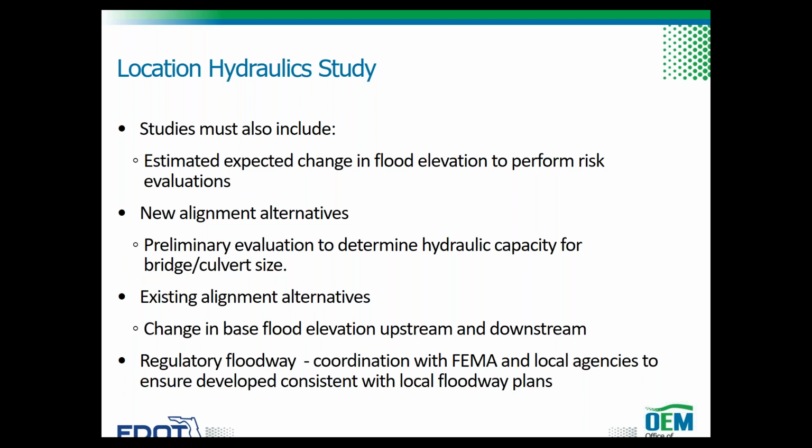The location hydraulic study should also evaluate the floodplain impacts to determine any increase in the number of flood receptors, as well as increase in damage to flood receptors as a result of the increase in flood elevations. If necessary, appropriate coordination with FEMA and local natural resource and floodplain management agencies should be initiated to adequately assess flood impacts.